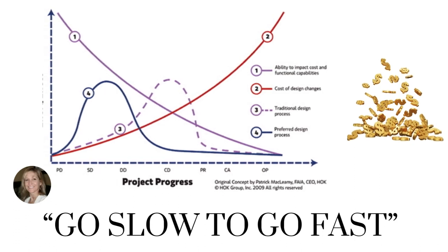you can start a lot of the early processes much earlier, like early procurement, ordering materials before your building is even finally designed, so that you can get through the procurement issues. And so all of these things I'm talking about are all of the things that we are living today in our environment, between delivery of materials, procurement, cost escalations. And so IPD is a great process to manage the risk of delivering a project on time. That would be my number one as an owner. Go slow to go fast.